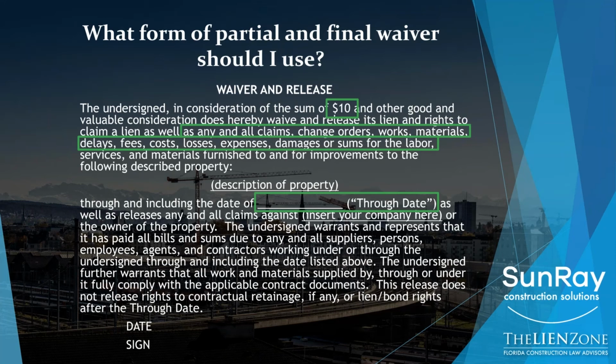But the same is true in reverse, right? So if I am signing this release and I haven't paid all my bills, then I have to be careful about representing that I have when the release has language like this. We generally find that most sophisticated contractors, and most contractors are pretty sophisticated these days, are going to have broad releases like this that they're going to expect their subs to sign. So you need to be aware of that when you exchange your release for the check.